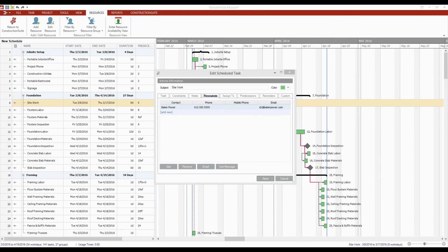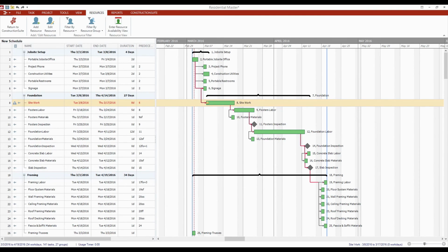So what else? Of course, as you guys go through and you start assigning your resources on the schedule itself, you'll occasionally get the little icons over here on the left-hand side to indicate to you that you have resource conflicts, or that you've got that ASAP feature set, or various other things could happen as well in this, like the task is moving along swimmingly, or maybe it's stuck in one spot, so you might see the little pause symbol there. But you'll also be able to use some of the information available in here to generate reports. Some of these reports are tremendous, like you've got conflict reports over here on the left-hand side, or if you guys are using workflows, then you can do a baseline schedule report to show the results of any delays that you guys might have hit.